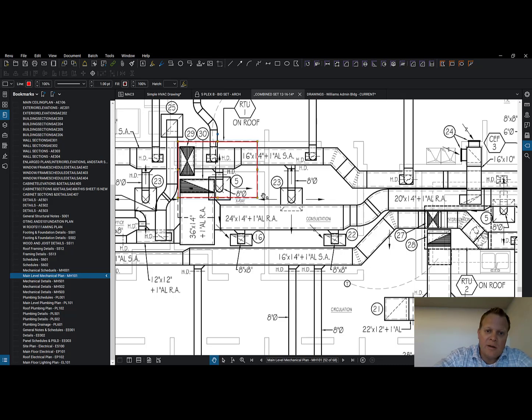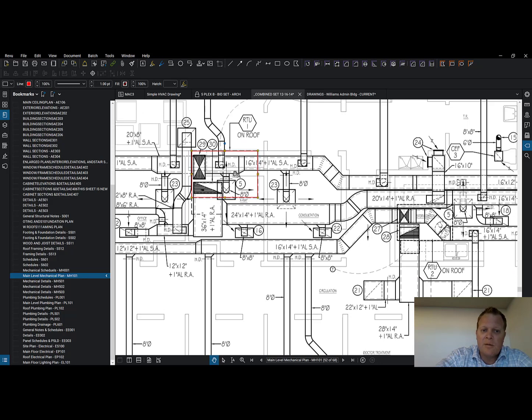So it doesn't really matter to any of this point, but we need to get this equipment, whatever rooftop unit it is, pull their product data, and go give it to the framer to show them exactly, get the mechanical contractor and the framer to work together, because look at that dang opening. That thing is a good size for that return air. 36 inches.